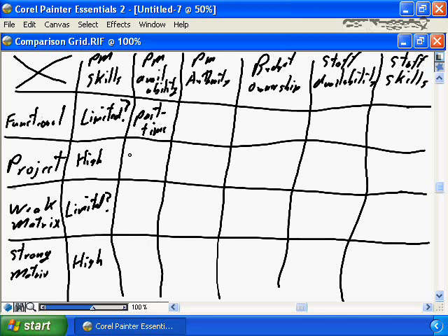From a project organization viewpoint, their only focus is on project management, so they have full-time availability for project management. The weak, the same as the functional, because it is the same manager from the line management area, again is going to be part-time. Where the strong matrix, the assumption is because they are the staff PM, their availability is going to be 100%.